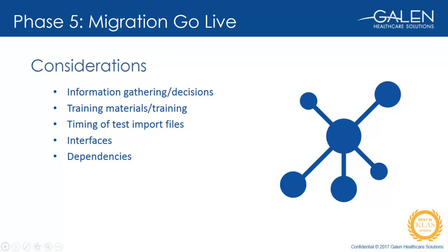So just to reiterate from the beginning of the project, the PM will collect and keep track of all these open issues, and basically, from week to week, keep track of things that need to get done. And then in the go-live planning, we would review this data and bring it up for go-live consideration. Another way to collect the information is to review team emails and exchanges and pick out the issues and discussion items that are raised outside of the organized calls.